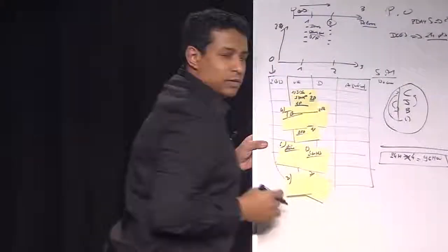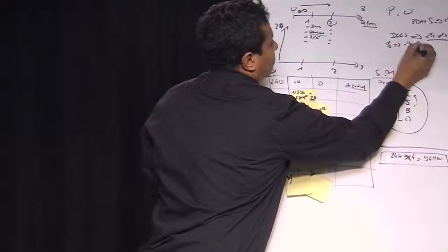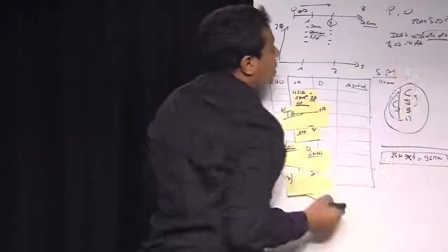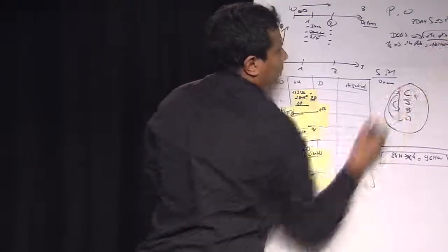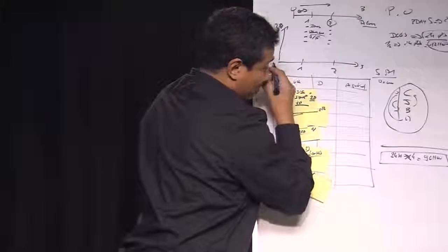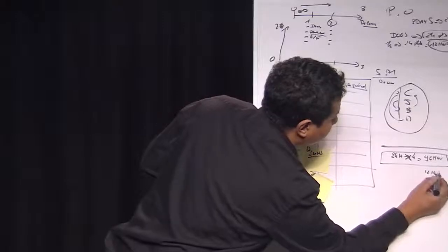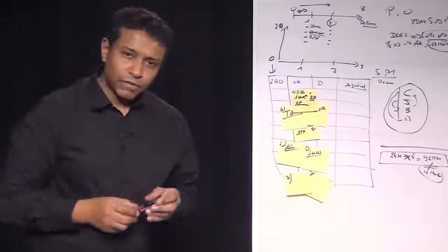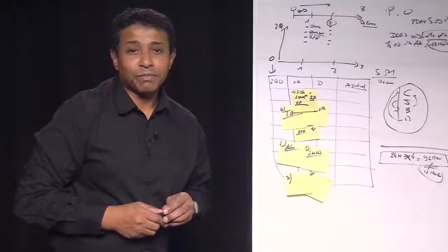Because we said that half an hour is 24 points. So our project of 24 points is about 12 hours. 12 hours compared to the 96 hours that can be done. So the answer is, in a normal way, yes, it can be done.